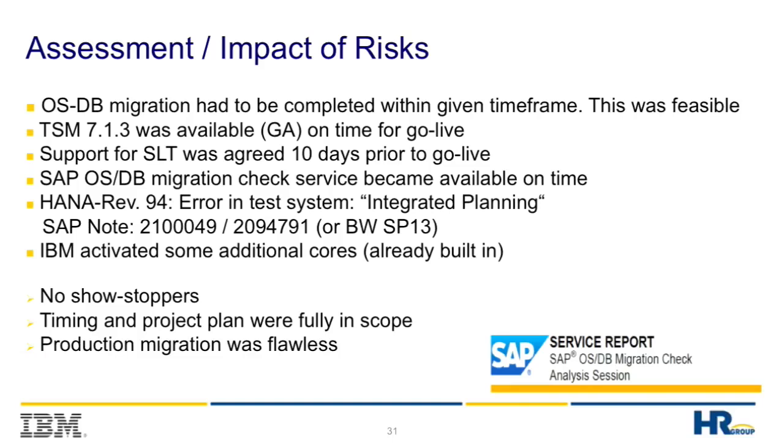Impact of risks, I said that already. We had no problem with the traditional SAP export-import, only with the replicated tables, so we had to do that manually. That was the workaround. TSM was available. Support for SAP SLT is now also supported on the Power platform. We got that 10 days prior to the GA, the final migration.